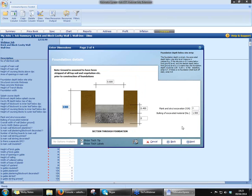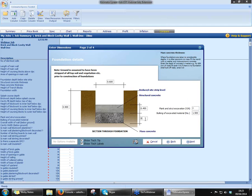Click on Next, and you've got your foundation detail. Again, you've got your tech tips, so you've got a little bit of help there as a new user. We've also got tech labels. A few builders recently are getting their sons involved with estimating, even getting the girlfriends and wives involved — but obviously, they might not be fully up-to-date with building terminology. So these tech labels can help them understand what they're seeing on the screen. So all you're doing now is changing the mass concrete thickness, the structural concrete thickness, the depth of the foundation and the width of the foundation. It's asking about plank and strut — obviously there's a cost to that, most of you probably will use plank and strut. And obviously bulking up of all the materials — the software's clever enough to know that when you dig out a ton of clay, as soon as it hits oxygen, it bulks up.